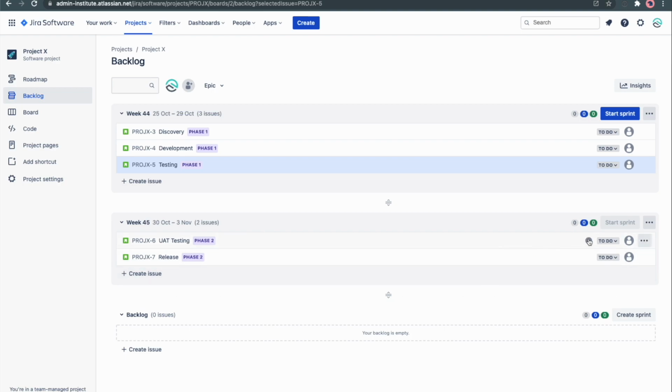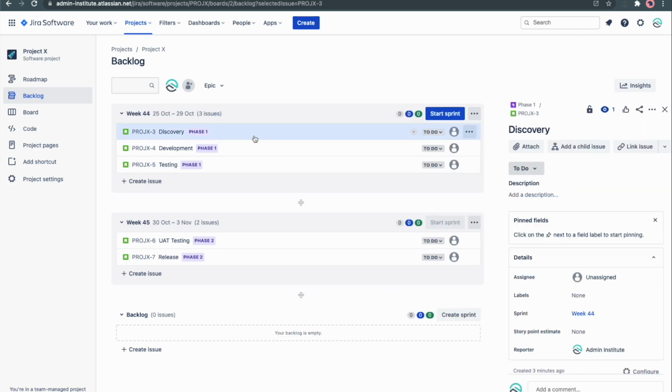An important thing that is key, I think, to managing your work output throughput is to leverage story points on your tasks. And that's what this little dash button here is. It actually exposes this little ticker where you can put an estimated story point. Again, that's another agile concept we don't really want to go too into in this video, but essentially you're estimating the amount of work that particular effort will require.